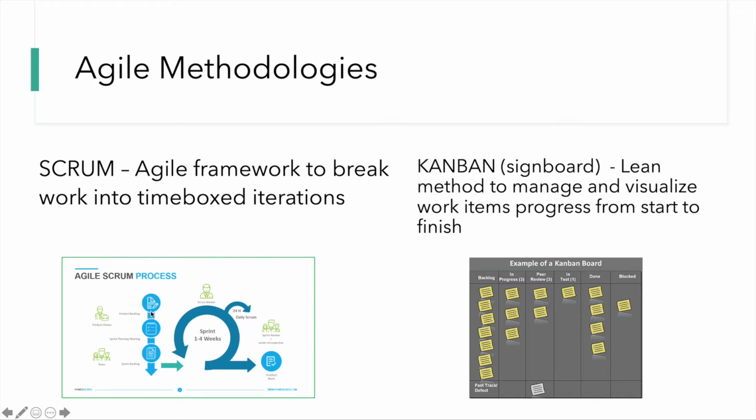So once you create the whole chunk of work, which is the product backlog, you have something called a sprint planning meeting, where the product owner would prioritize what tasks or what particular work items need to be completed in a particular sprint, and then he will create a sprint backlog. The whole team will help with that, and then they estimate the amount of work that needs to be done in that sprint, and then the sprint begins.